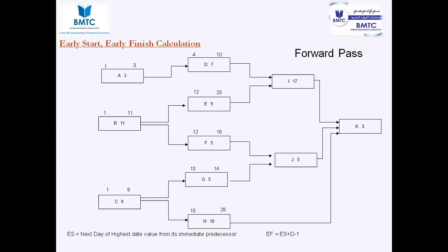See, now D and E are getting merged into I, one activity. Two activities are merged into one activity. Point of convergence is happening. Before that, point of divergence; here is a point of convergence. Again, it's a bottleneck. If we are not taking this seriously, it will impact our duration. If D and E get delayed, I will be impacted.